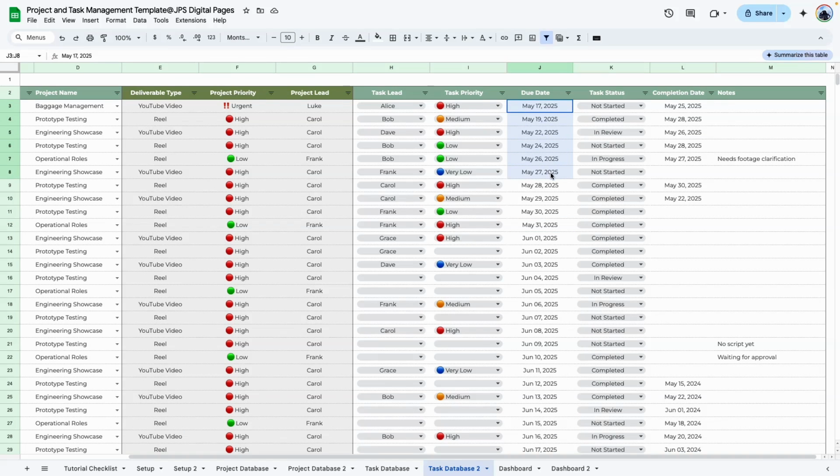Let's go back here. So here are our tasks that are overdue. I think we have about 7 of them. So any date that is before the 29th, which is today's date, but it's not going to count all 7 because the task for May 28th is marked as completed and the task for May 19th is marked as completed. So that brings us down to 5.